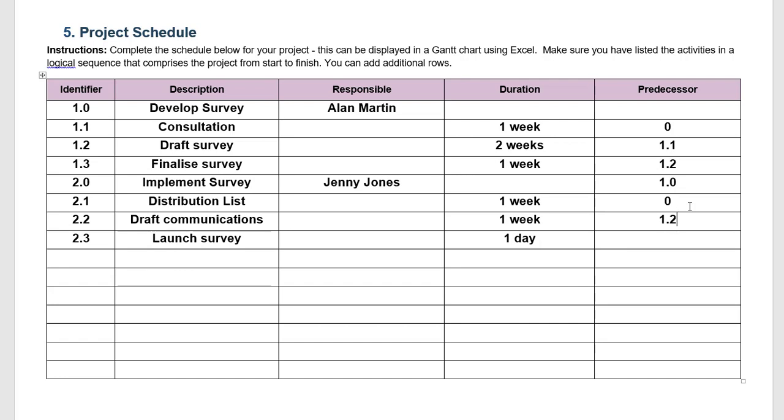Drafting the communications, that will probably depend on either finalizing or at least having a draft of the survey. So I'm going to put 1.2. We can't really figure out the draft communications too well until we've got some sort of a draft survey where we know the type of data that we're collecting. And the launch of the survey really can't happen until we've drafted those communications because that's going to go out with the launch of the survey.